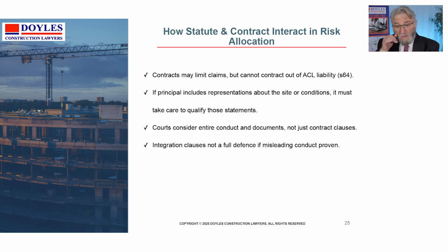complete the works. So looking at some related legal documents, you've seen we've talked about frustration, about the fact that if the performance is radically different, then somebody might be excused from the responsibility of a latent condition. They're rare in construction because the courts expect the parties to allocate responsibility sensibly, and frustration must be not self-induced. That is, it must occur without the fault of either party.